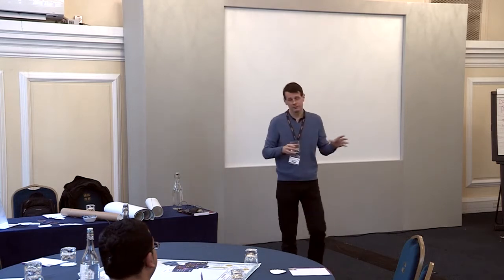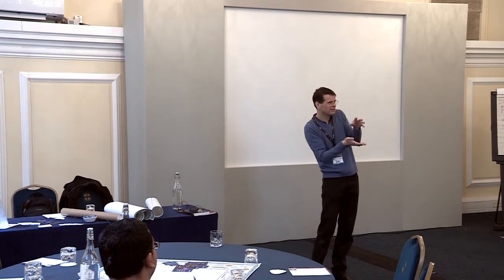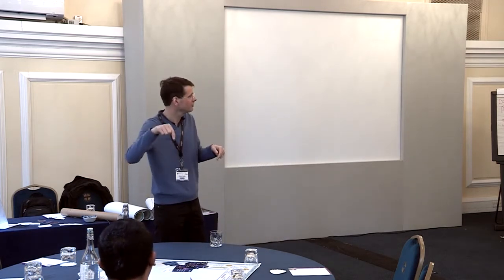So this team, we did these retrospective dialogue sheets with them. What you can do if you've got a large team is split up; these sheets work well if you've got between about 3 and 8 people. Below 3 people, you can't really have a discussion because it's more of a one-on-one conversation. So when you've got about 3 people, you have a proper discussion. When you get to about 8, these sheets tend not to work so well because it's physically difficult to seat 8 people around this sheet.